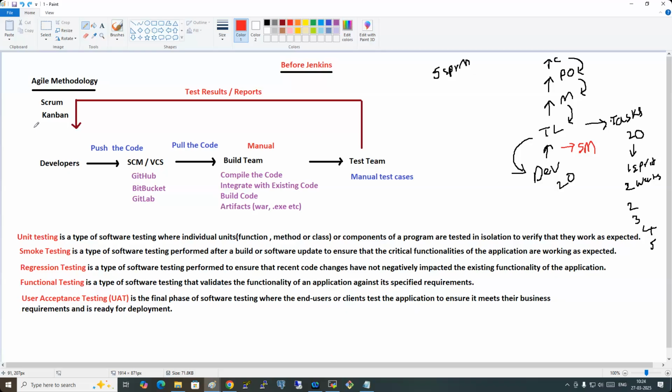You go and create. For this, do I need a sprint? Will you say that, sir? This will take 1 day, 1 minute, 1 day, 2 hours, 2 days to launch an EC2 instance. Do you need that? Simply, what I do, I'll create a task for you and assign it to you, complete it and drag it to complete. That's it. So if you don't want to track the number of hours, you just need to track the tasks, then go for the Kanban concept. What is that? Kanban.